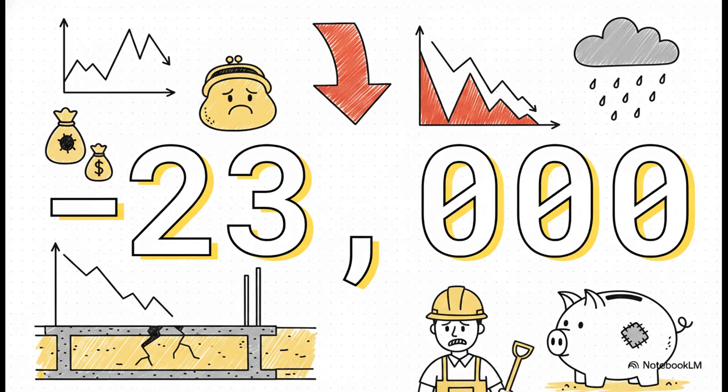But what's really interesting about this data is week 0. Look at that negative 23,000. Your outflow was completely dominating your inflow. When your forecasted cash flow shows more money bleeding out than coming in, you are staring down the barrel of pessimistic overdraft requirements. You literally have to anticipate these dips and make sure you have the financing ready to cover them, or else, like we said, everything stops.